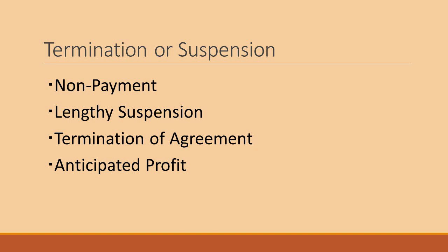If you have to terminate your architect before the project's over, you may or may not get the license to use those drawings. And we'll talk about how these provisions allow for that depending on the circumstances. If you can't use those drawings, you have to pay the new architect to start over, and that's going to be expensive. Especially if you're under construction, well then you don't even have the license to use those drawings to complete the construction. You have to use new drawings, so you're going to have new costs there.